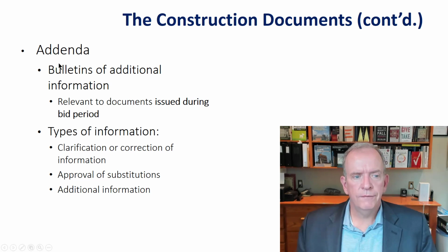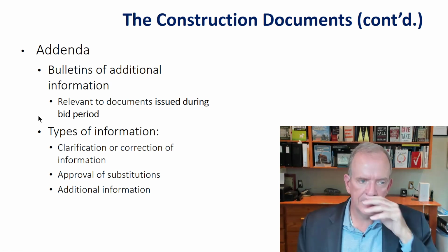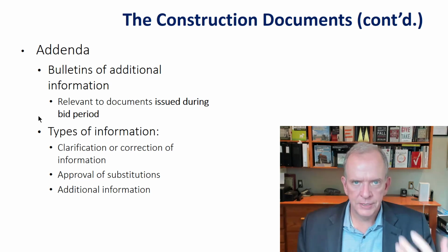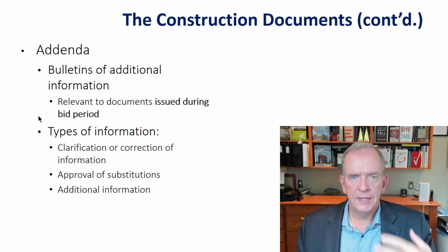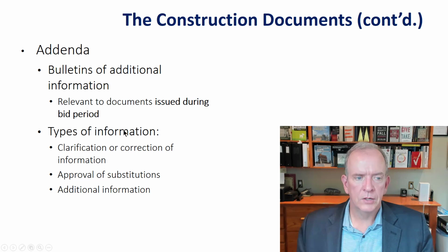Addenda, well, usually that's if you are bidding on a project and something comes up during the bid period. So then you get an addenda to say this is a notification to say this is changing, and you make sure that all the bidders have received that addenda, and then that should be included then in the new price to fix whatever was wrong or missing in the original contract documents.